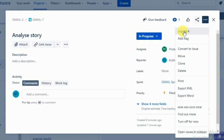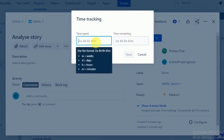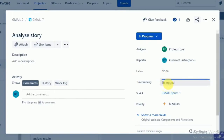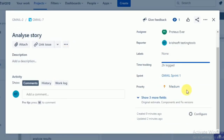Each and every day, each team member needs to burn six hours. At the end of the day, the scrum master will take the burn-down chart report and understand how much work is completed and how much is spending. For example, I want to log 2 hours for this task. Enter '2h' and update work done — 'analyzing the user story done.' Click save. You can see: time tracking, 2 hours logged for 'Analyze Story.'